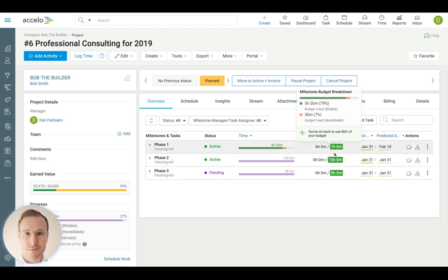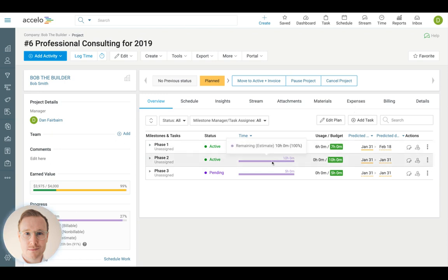So if I was to invoice this project on full budget, I would be looking at 22 hours worth of budget, plus, of course, any materials and expenses that are also there inside the project. Also, what we should be looking at here is the work that's been completed, how far along we are in a project, as there are certain functions for doing percentage of work done or percentage of total project as well. So now that we have an understanding of the work that is actually rendered on this project and how much is budgeted, let's go through to the create function here, through the invoice,